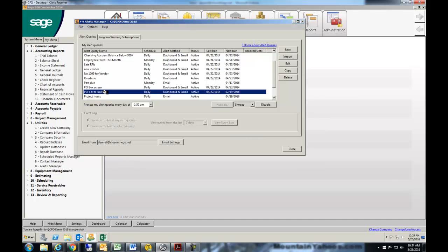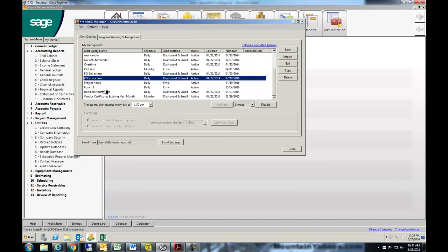Another one some of our owners really like is they give people kind of a blanket authority, let's just say up to $5,000 or $10,000 on purchase orders or subcontracts. We can actually send an alert out each night or once a week that just says, hey, these POs were written last week and they exceed $10,000, and this is who they were written to, and this is the job they were written to. They may already be aware of them, but it's just to make sure nothing sneaks by over that limit that they haven't seen.